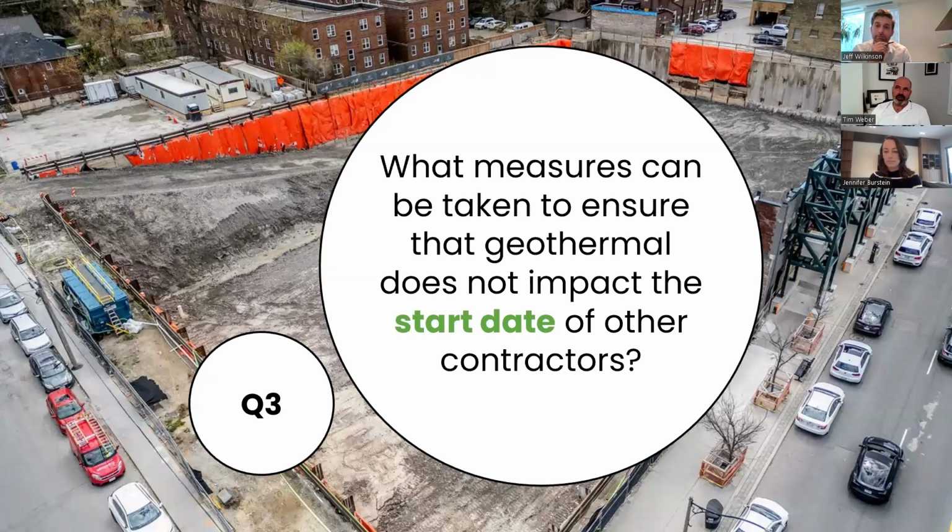And what we try to do is if shoring is going to start on the north east corner, we'll start our drilling there and work away from that corner rather than working towards it. So if the drilling's delayed by a couple of days, there's no reason why, there's one rig left, most of the stage, the pipe's gone, everything's gone. There's no reason why a shoring contractor can't mobilize and get started while we're finishing up on the other side of the site. But that's where that pre-planning kind of comes into place, right?